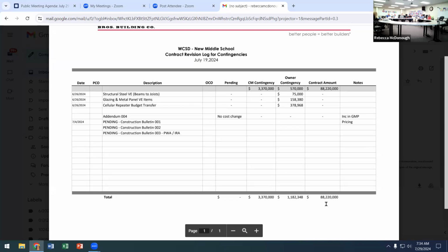Typically a new design will come if necessary, and then Adam and his team reach out to subcontractors to get pricing. Depending on the level of the pricing, it's either presented to the superintendent, who has the ability to approve up to $50,000, or to the facility committee if it's in the range of $50,000 to $99,900. If it's above that, we have to take it to the school board for approval. Administratively, we're assuming the approval levels the board approved for Heritage are continuing forward, so we're still working under those approval levels.